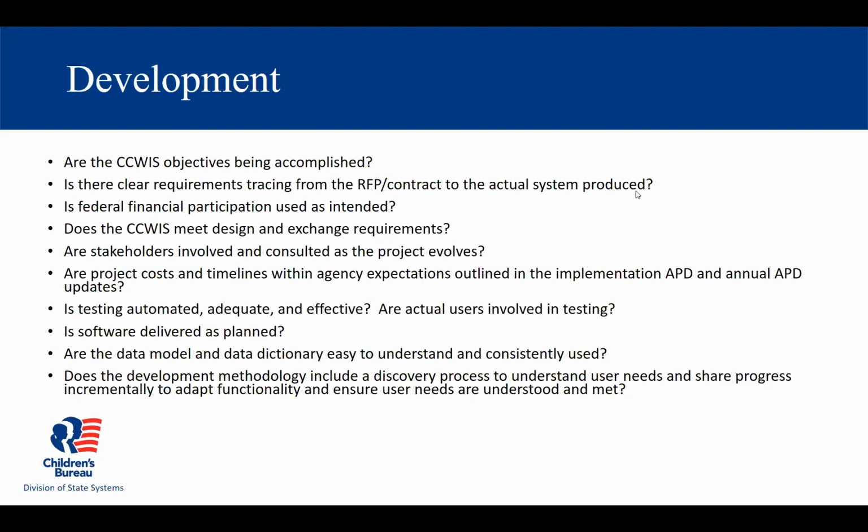It's really important to have open and effective communication with the stakeholders so they have opportunities to provide input and to alert staff to changes that may affect the system. For example, if there are new laws or policies that are coming down the pike, it's very helpful if they have a direct channel to the project so they can alert the project to these changes and discuss the impact these policies and laws may have upon system development. And the same thing if there are new technical or security constraints coming from the state as a whole.